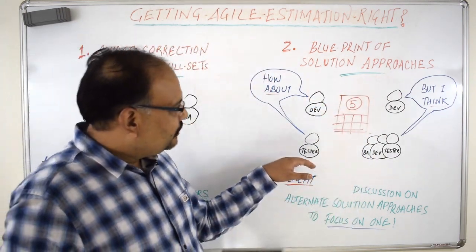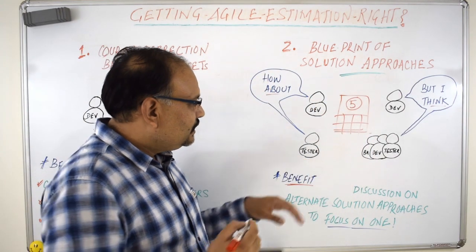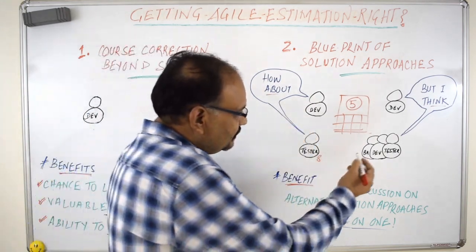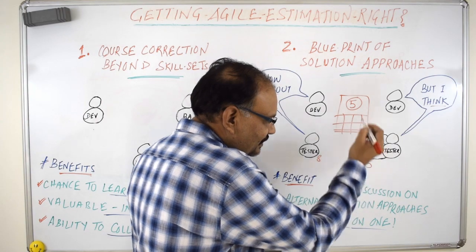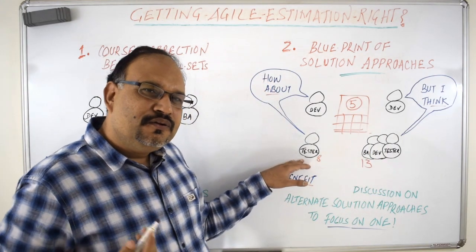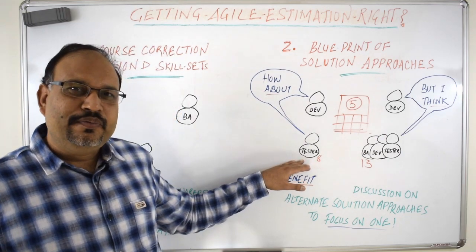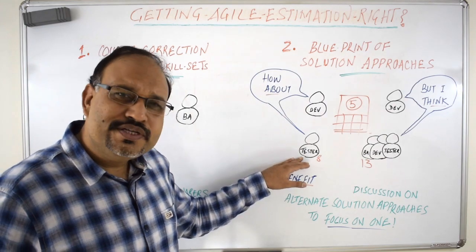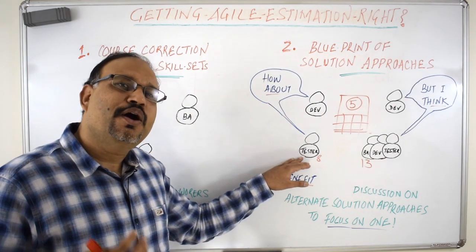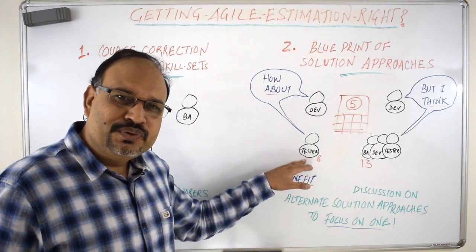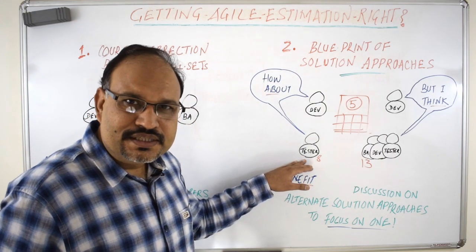Now in another scenario, a tester is estimating the story at 8 story points. The rest of the team is estimating at 13 story points. The team tells him that, see, your test environment is dependent on a third-party vendor and we have seen it quite often going down. So why don't you make a provision to mock the services in case the environment is down, and therefore keep some buffer and estimate this story at 13 story points instead.